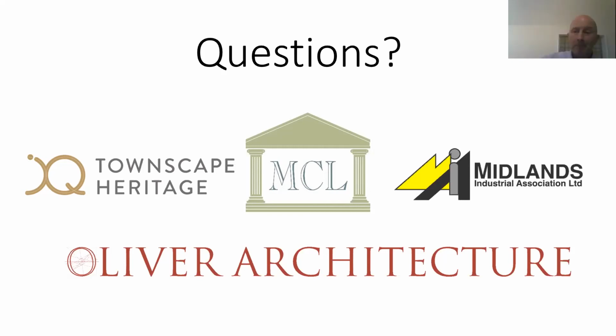Not a problem. I think also probably one to add, because people might be interested, this project did actually start on the 6th of November. Oh no, it didn't start on the 6th of November. It started early January in 2020, and then we had a period. Was it 6 weeks that we closed down due to COVID? 7 weeks. Yeah, 7 weeks. Due to COVID. So that moved the completion date, which should have been 6th of November, to the end of January, so it's taken just over a year to get it done.